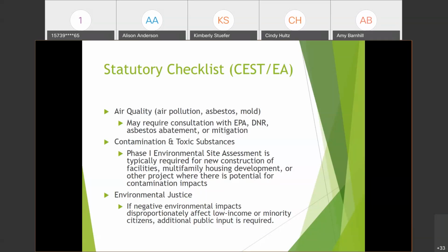Then the environmental justice is if there were any adverse environmental impacts identified in your ER up to this point. You have to consider how it impacts the area. And so you're just looking to make sure that there's nothing that adversely impacts disproportionately high for low income and or minority communities. Let's see. Next slide, please.